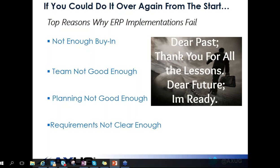And we found that that's really one of the biggest issues, is people just hadn't thought about those exception cases before they went live. We've actually had quite a few companies reach out to us and say, we're going live next week. We are not confident, can you be there for some secondary support or end up becoming our ongoing support? That's one of the first things we'll do, is come in and assess what processes were missed or are going to be challenges, and at least talk through the backup plans beforehand, even if it's manual.